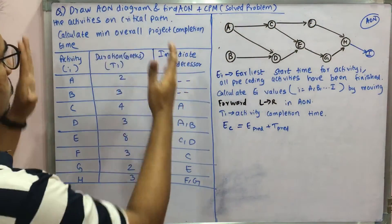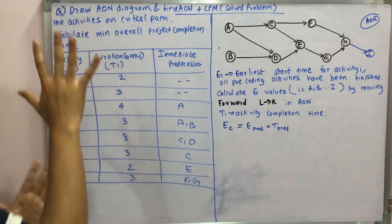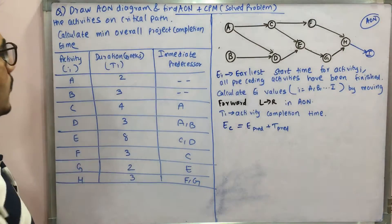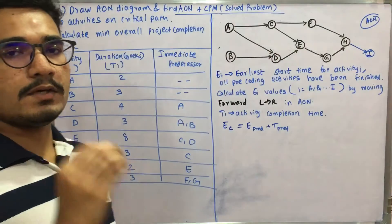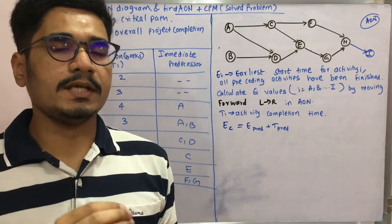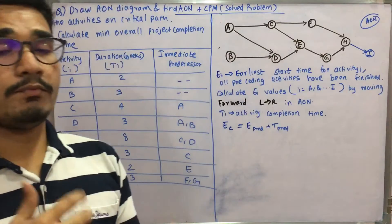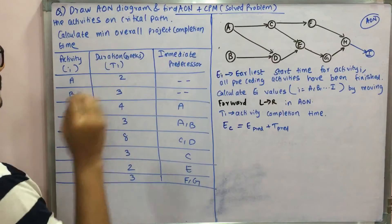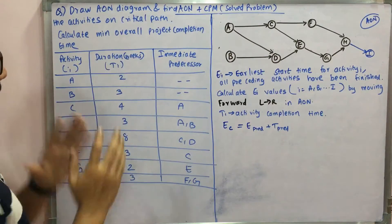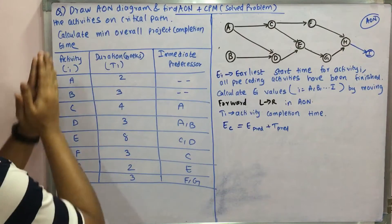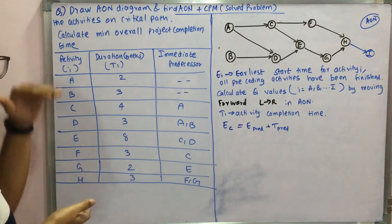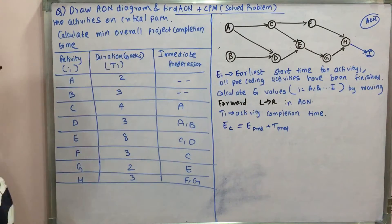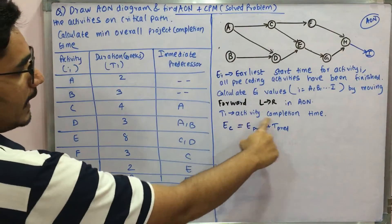First, let's look into the problem. You need to draw an AON diagram — Activity on Node — and you need to find the activities on the critical path. The critical path is the path which takes the longest route and the minimum amount of time for completion of a project. You need to calculate the minimum overall project completion time. You have been given a table with three columns: the activity, the duration given in weeks represented by TI, where TI is the activity completion time.